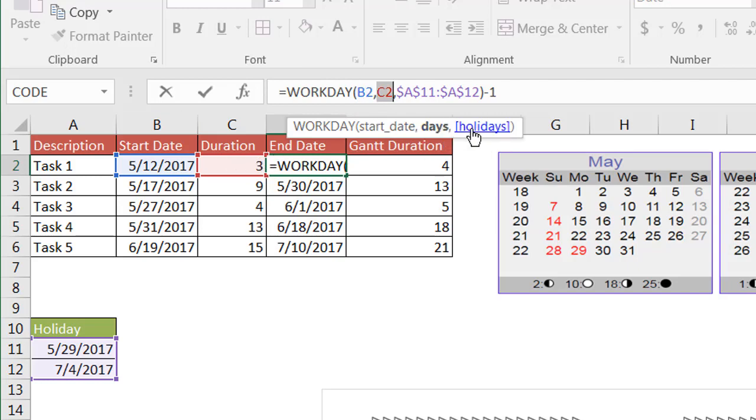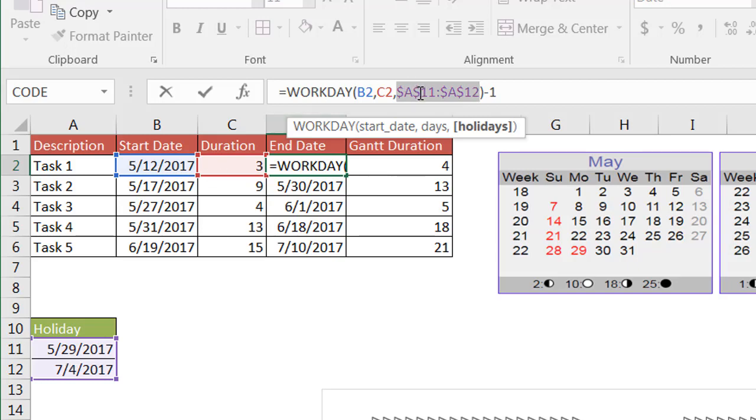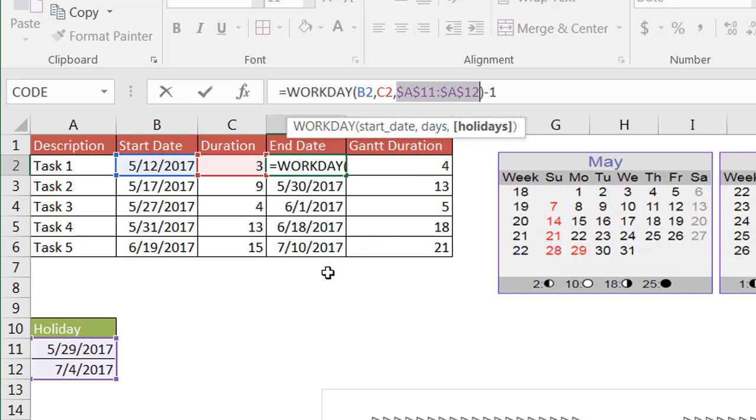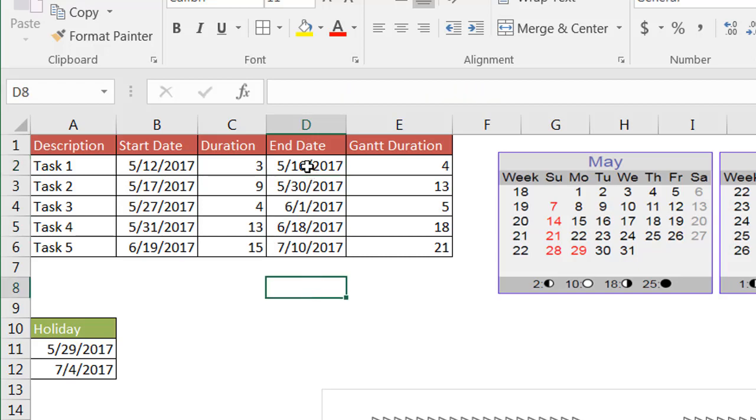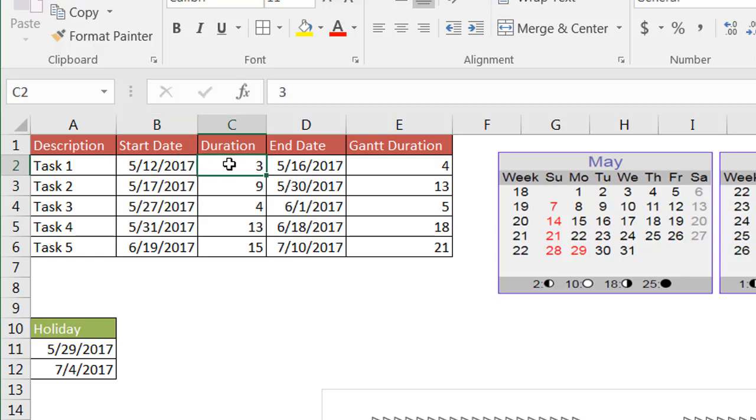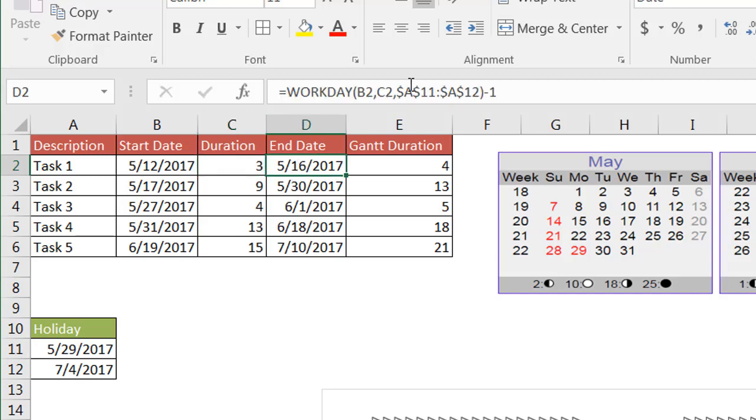Now the holidays, this can either be blank or you can select a range where you identify some days as holidays. You can see here I selected A11 to A12. These are going to be the holidays here. If your particular example doesn't have holidays, you can leave this blank. That's why we have those brackets there indicating it's an optional argument. But the required arguments are your start date and the days. In this particular example, what it's going to do is take this date and add this date to it, irrespective of the weekends and any holidays, and give us our end date.